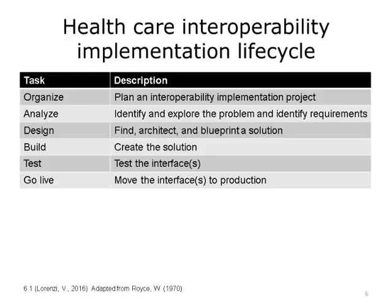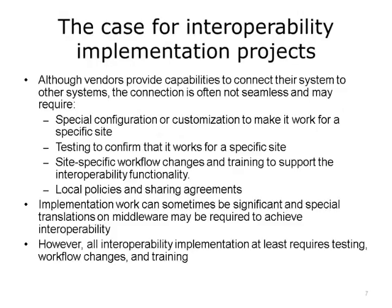In the life cycle, you begin with project planning, then you explore the problem and discover its detailed requirements, then you determine the best way to solve it, you build the solution, you test the solution, and you carefully and methodically put your solution into production. These steps should be included in a project plan when implementing interoperability, because skipping steps can lead to problems in production that could create financial costs and compromise patient care. You should expect to have to go back a step or to repeat steps. Although vendors provide capabilities to connect their systems to other systems, the connection is often not seamless and may require special configuration or customization to make it work for a specific site. Testing to confirm that it works for a specific site, site-specific workflow changes and training to support the interoperability functionality, and local policies and sharing agreements are all important considerations.